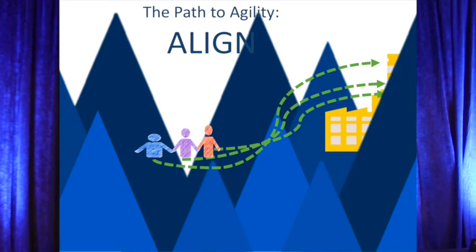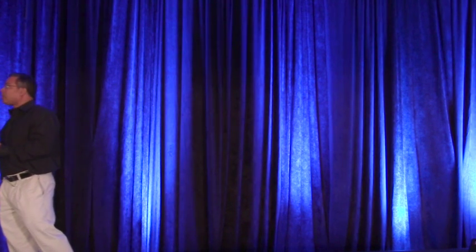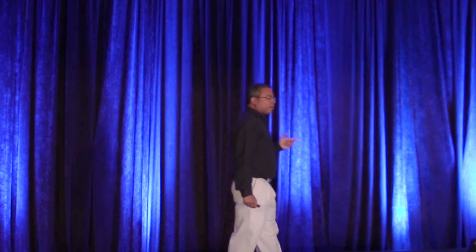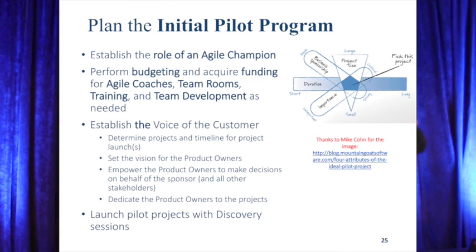So the next stage in our process, assess, align, is to run some pilot projects. They choose to run 5 pilot projects, and on those 5 pilot projects, they want to baseline their process. But in order to pick those pilot projects, they follow a very careful methodology. They don't want to pick the wrong projects. So they pick projects that are not too big, not too small. Look at that little diagram over there, in the sweet spot. Somewhat critical, but not bleeding edge.